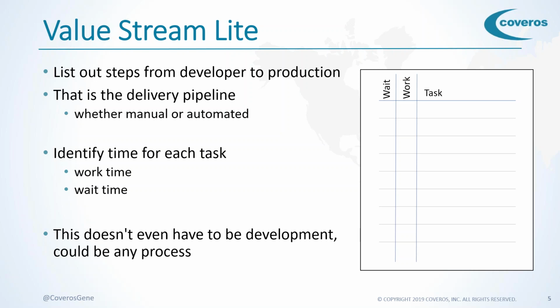And like I said, I send people out of our courses and my talks whenever we do value stream with the idea of go back and do this at home. Put something up on the wall and just start filling in things. You start noticing things are missing, add them, and keep track of them, and really get a feel for what you really do. Because a lot of times people write down only 5 steps when I start asking. So, you do step 1 and then it immediately falls over to step 2. Oh, well, no, we send it off to this other group. But when they come back, then we start. It's like, okay, add that. And start realizing there's a lot of extra steps in their processes.